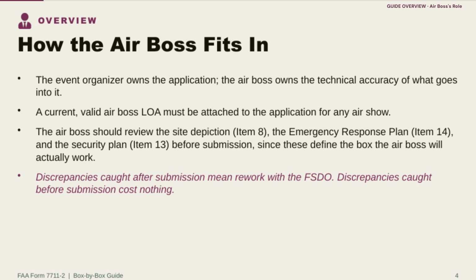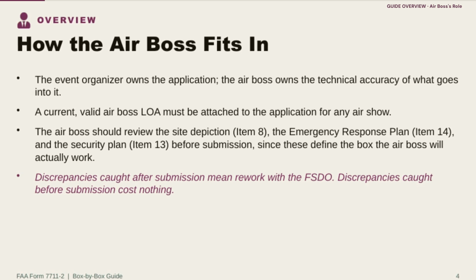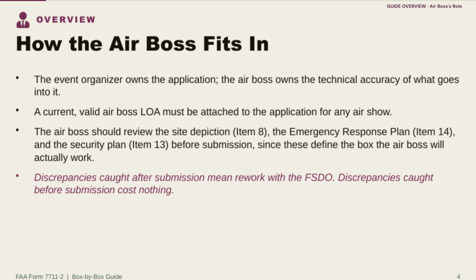The timing here is what makes or breaks this. Catching a discrepancy after submission means rework with the FSDO, delays, and possibly missing that 45-day window we just covered. Catching the same discrepancy before submission costs you nothing but a careful read.